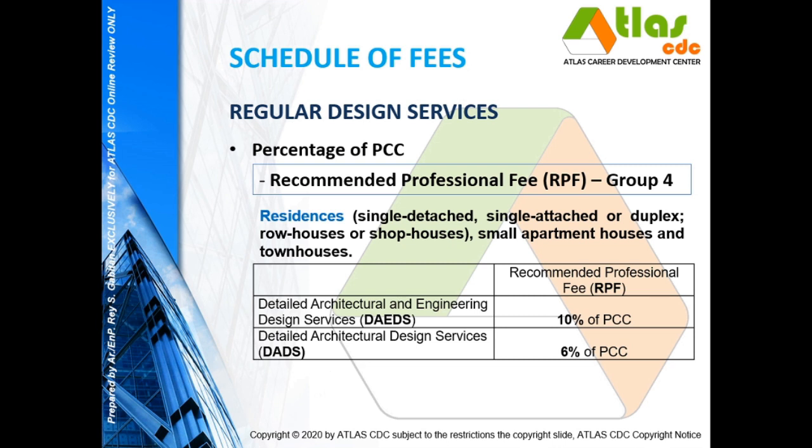So for group 4, the recommended professional fee for DAEDS is 10% of the project construction cost, and for the DADS is computed at 6% of the project construction cost.